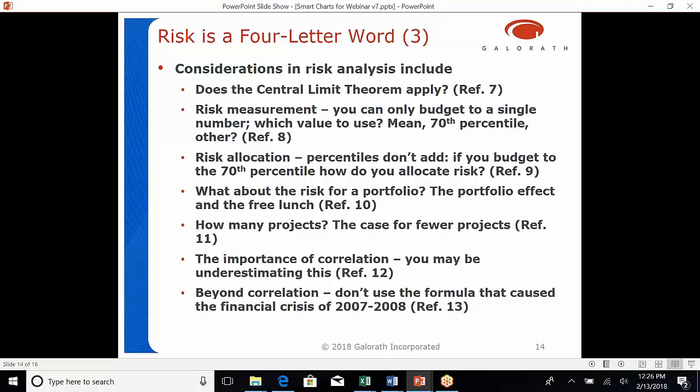It's also important that you incorporate correlation in your estimates and in your risk analysis. For projects, the WBS can drive this number to be very high. So, for example, if you have a 200 element WBS, then you've got 19,900 items that you have to correlate. This is a lot. So what people typically do is they assign a single default value for all elements. A common value that has been touted is around 20%.